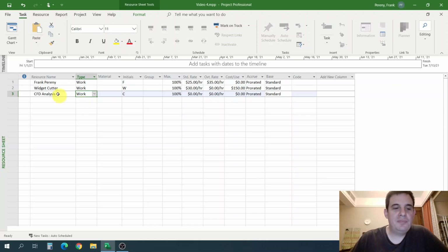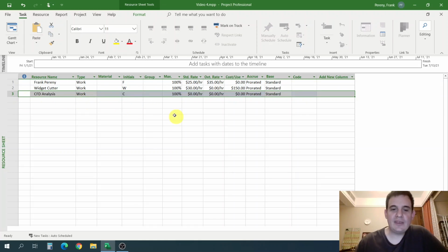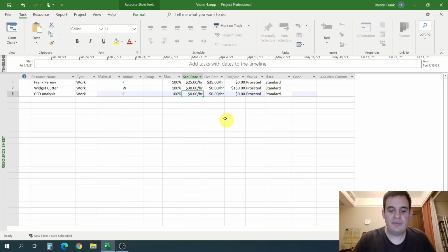So usually we pay for a company to do our CFD calculations. We basically pay like a server farm fee, if you will, and that server farm fee is based per hour. So there's no cost per use in that case, but we might pay $300 per hour of computation time for X number of cores on that server farm.